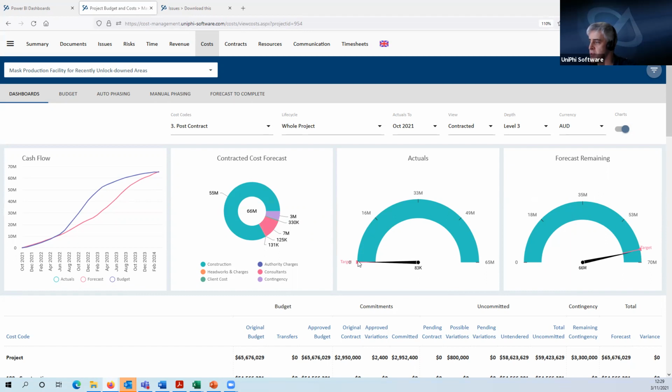So actuals to date, our target for what we were spending, which comes from what was in the budget, and the forecast here. At the moment, these match perfectly because we re-baselined. And in that re-baselining, they became aligned, but as each month goes past, that will change. And we can see whether we're meeting the target, of the actuals and the forecast and so on.